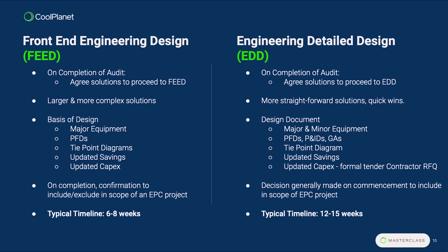And then just the final point that we wrapped up on this time last year was just about internal budgeting. It's not just the cost of delivering the decarbonisation solution once it gets approved. There's lead-ins to that for front-end engineering design, and even before that again for energy audits with your energy services company of choice. Some of that spend may need to go early doors onto an energy management system or decarbonisation management platform to start gathering that data. So again, it's looking at that process from start to finish in terms of from when you identify the solution through to when the solution's realised.